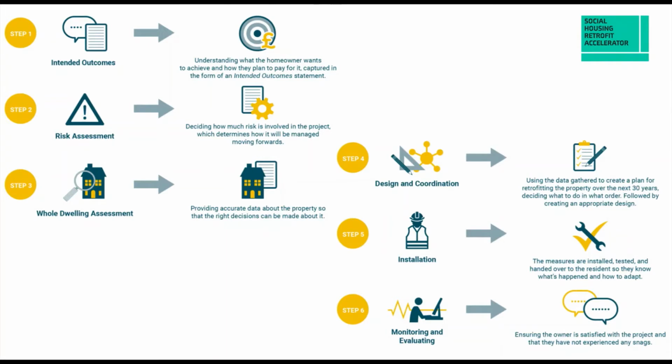And it clearly gives a person spec that they need to have XYZ qualifications if you're in a Path A project. They need to have XYZ plus ABC qualifications if you're in a Path B project, and then higher still qualifications if you're in a Path C. And that risk assessment helps make sure that you have a team that is appropriately matched in terms of their skill set to the complexity of the project.